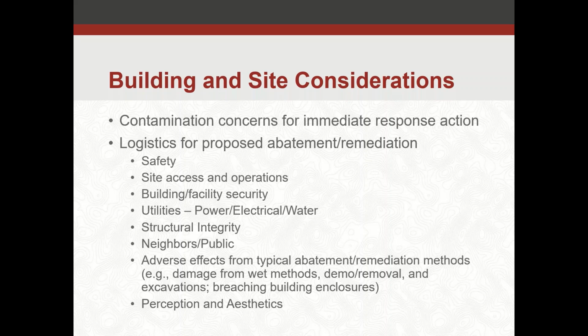Facility building security. Is it a type of facility with heightened security, where you need possible escort into the facility and escort out of the facility during your work? So all that should be planned during that design phase.